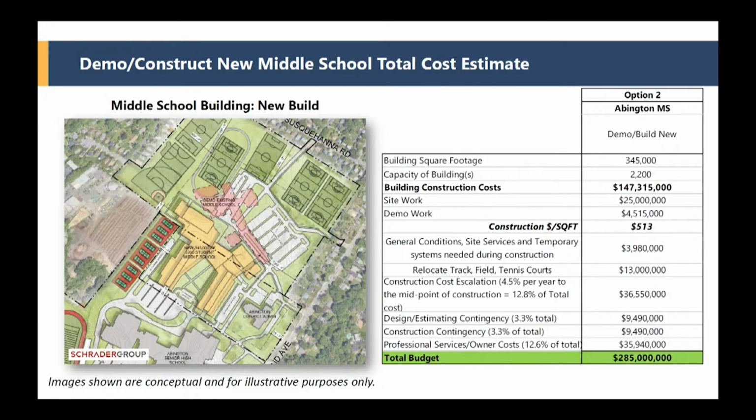But just to follow on to that, for states where referendum is the way that they do construction, this is the best practice. You don't invest a bunch of money up front. You go get the funding first by using the methodology that we used, sizing the program, and then you develop the program after that. The design comes after the voters have determined whether they would support it or not.